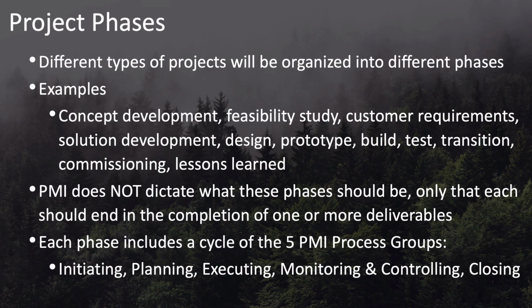It's also important to note that each phase, regardless of what it is, should include a cycle of all 5 of the PMI process groups. Each phase, no matter what it is, should have a little bit of initiating, some planning, some executing of the work of that phase. It should include monitoring and controlling of that work, as well as some sort of closure of that phase.